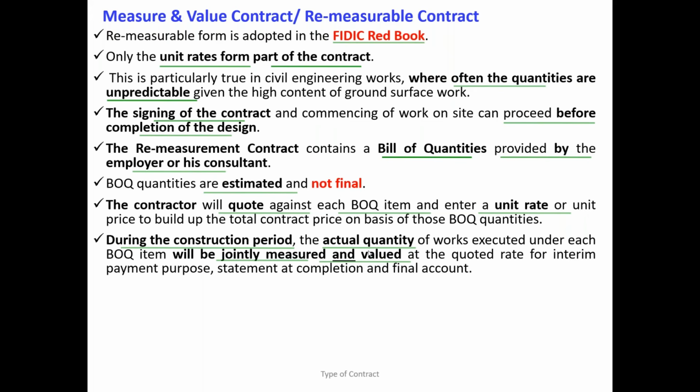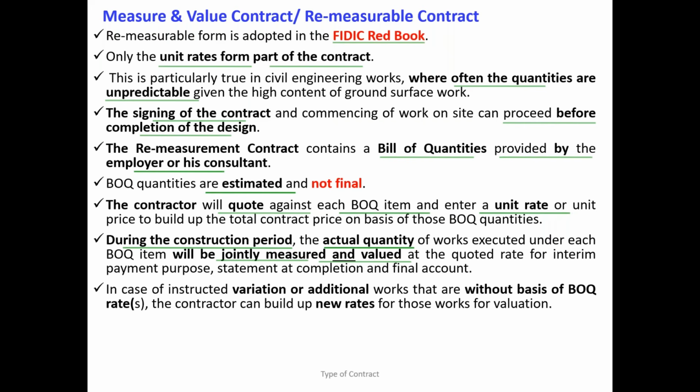Okay, so you understood. Even though the schedule of rates or prices appears in the BOQ, if the work is not yet done, you are not going to pay, because it is measure and pay. Work done, you pay. Work not done, you don't pay. Is the same scenario applicable in the lump sum contract? No, isn't it? We have learned something in depth. If people did not attend the last CPD, I sent you the video recording already. Go through and learn.